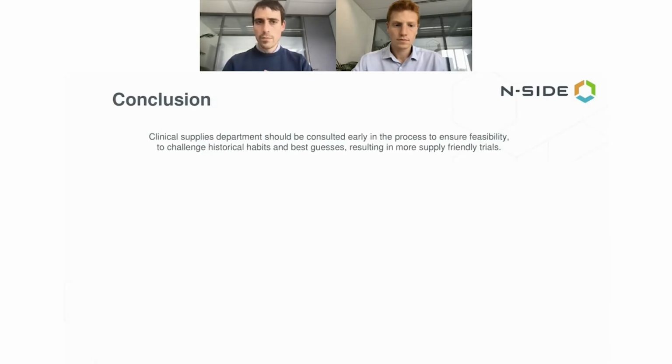So overall, again, this is an ongoing process. This might be a long process. And my recommendation would be to go step by step, to start with one single trial, to perform a retrospective analysis, as Alexis explained before, to see, okay, we thought that we had 30% of waste at the beginning of the trial. That's what we planned for. But then I remembered that we had to add an extra packaging release. The recruitment was delayed. What was the real level of waste at the end? And then you try to learn from it.